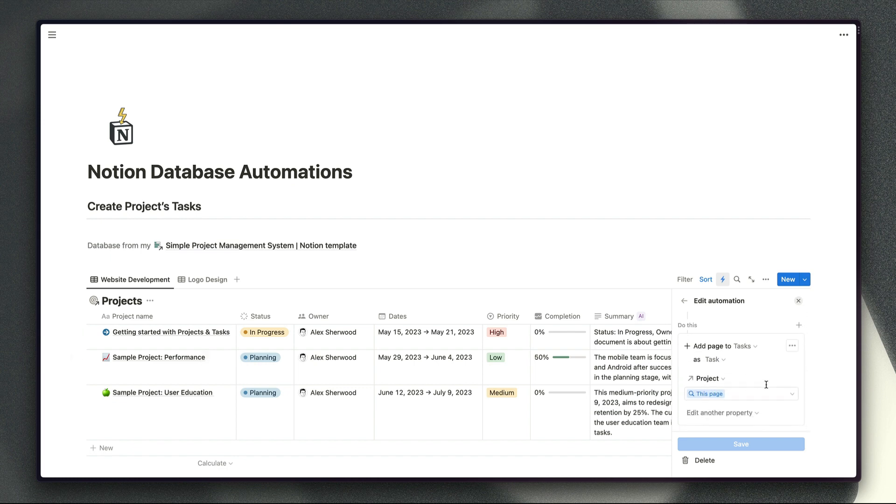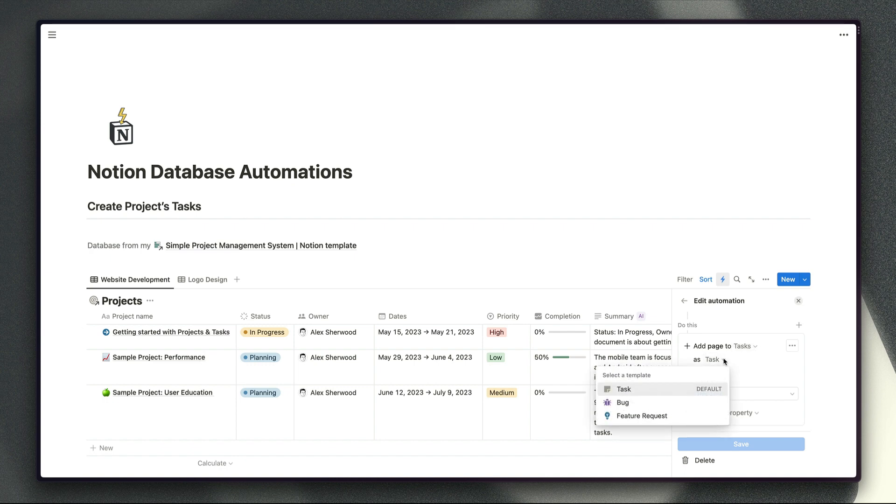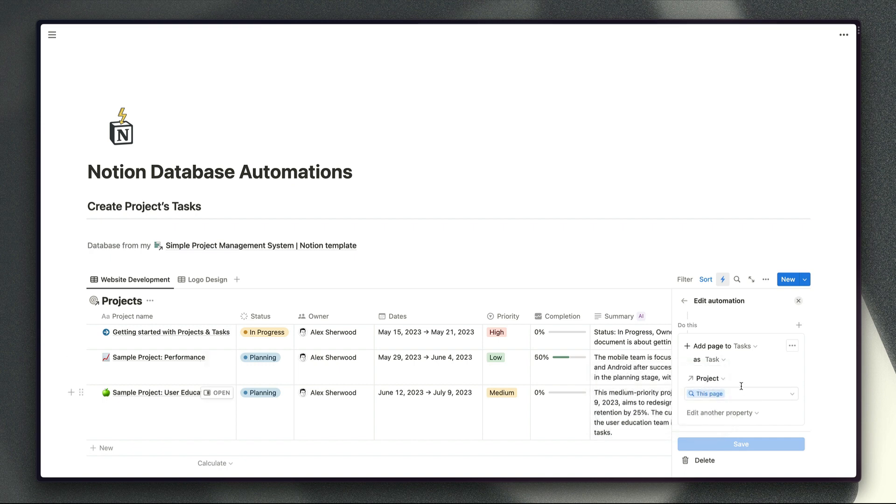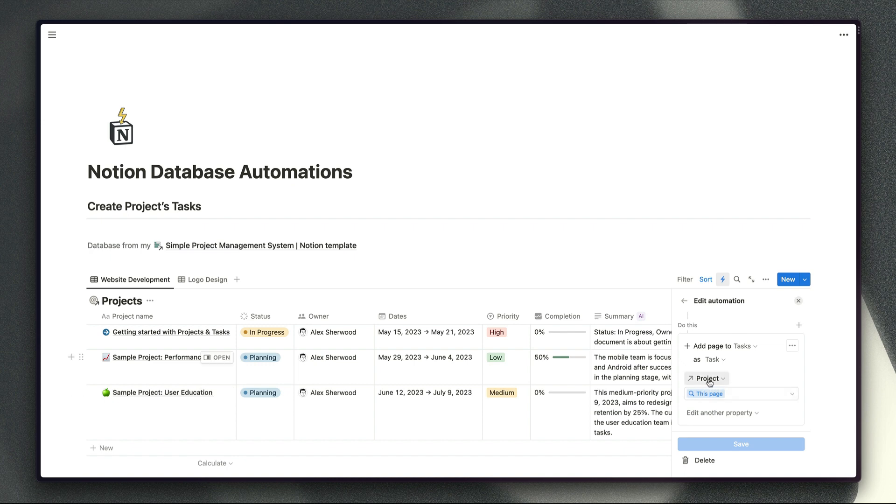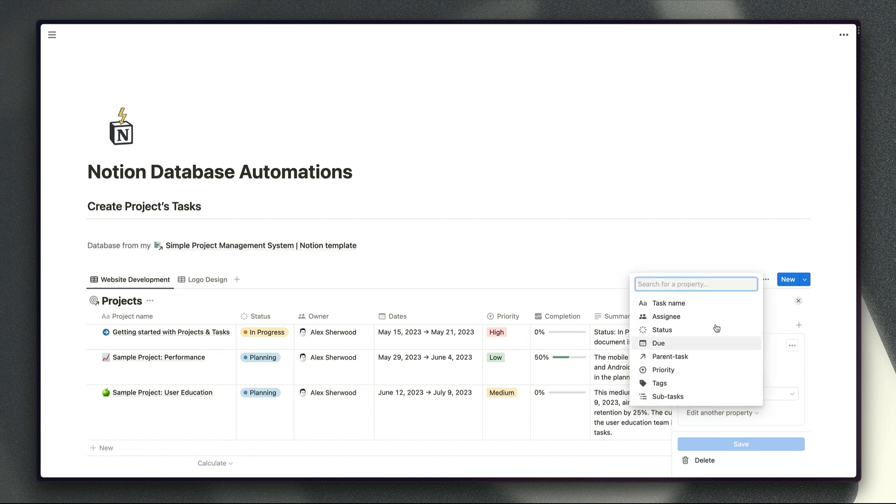When it comes to defining the different tasks you've got a couple of different options here. First of all we're selecting our task database as a database to create the tasks in. Then we can choose a page template to use as the template for that new task and we can choose to populate certain properties as well for those new tasks. So first of all the most important property to populate obviously is the one that links our task page to the project page. So for that we're just choosing the project relation that's in my task database and we want to populate that with a link to the page that's been created in my projects database so they're linked together automatically.